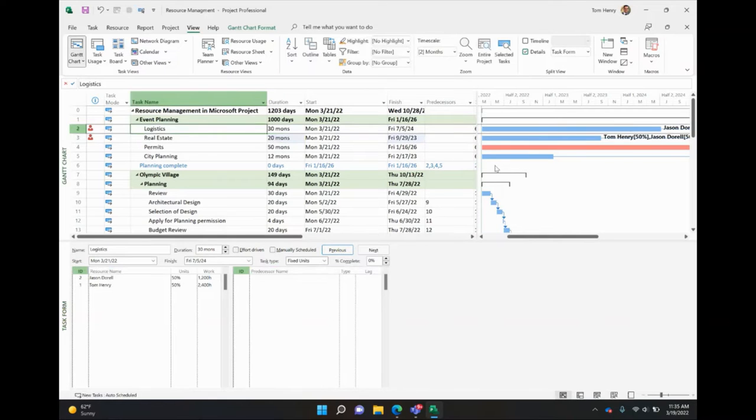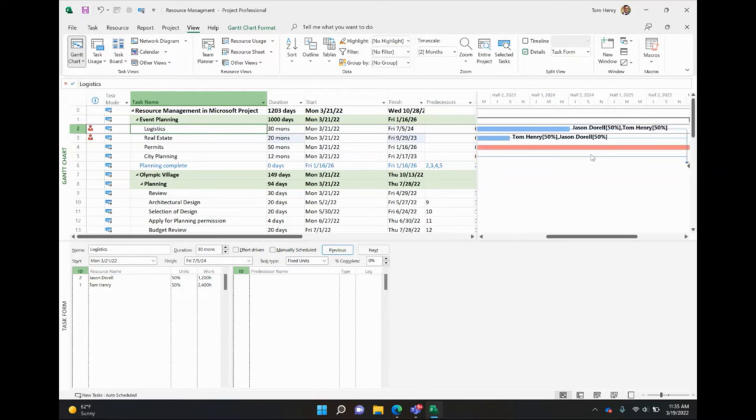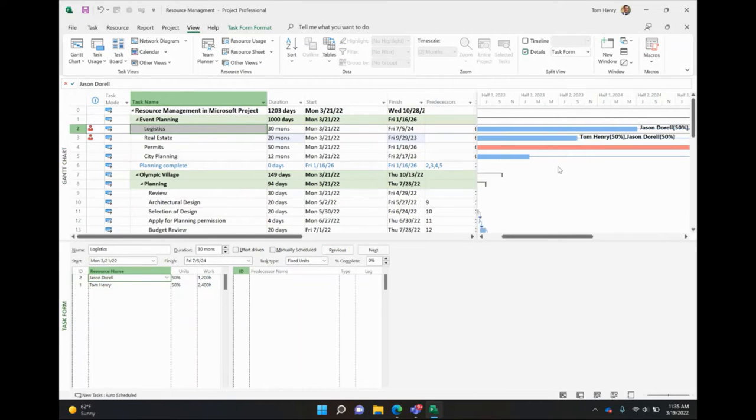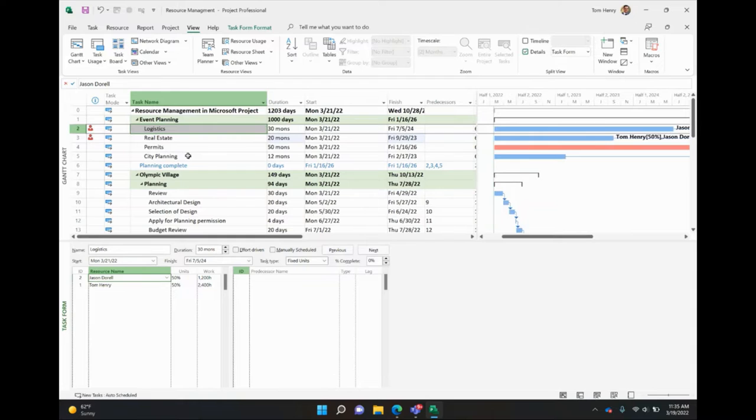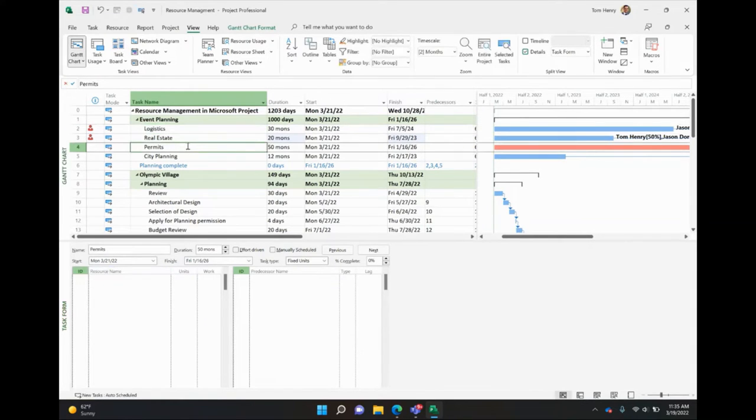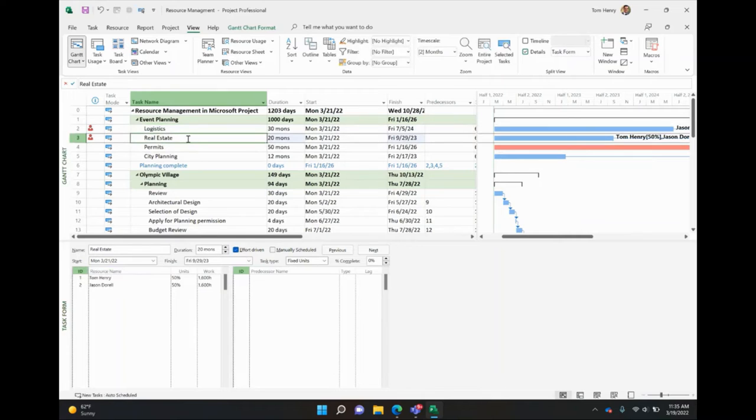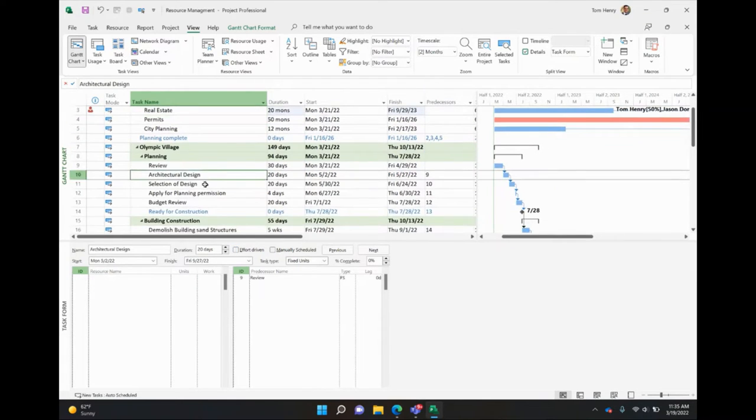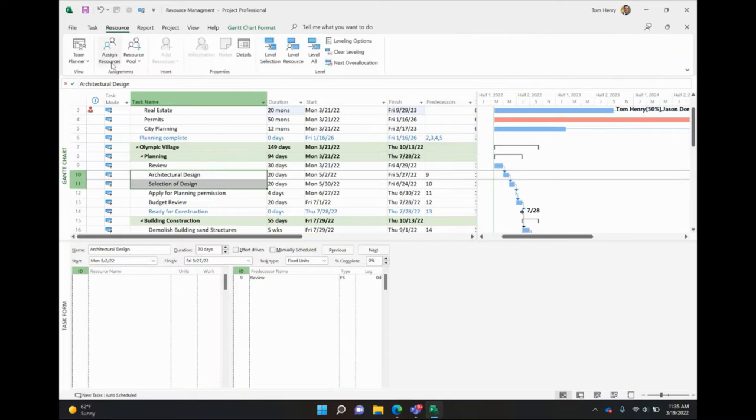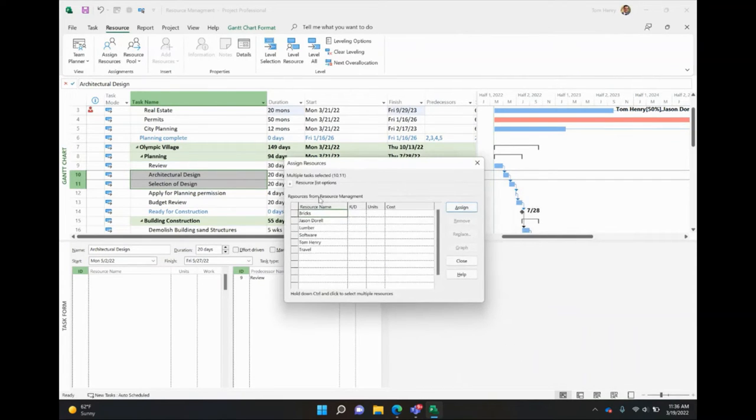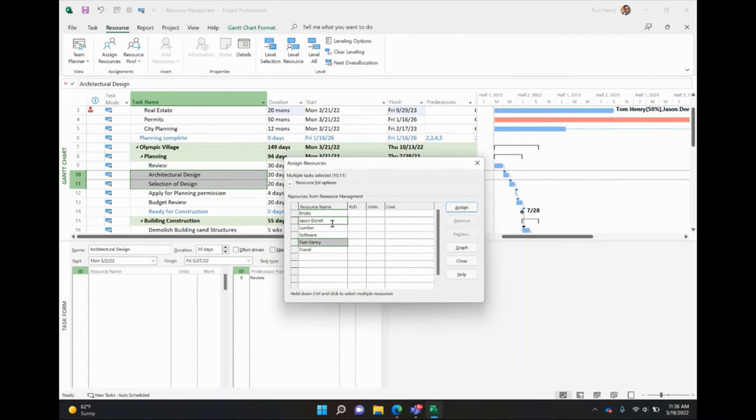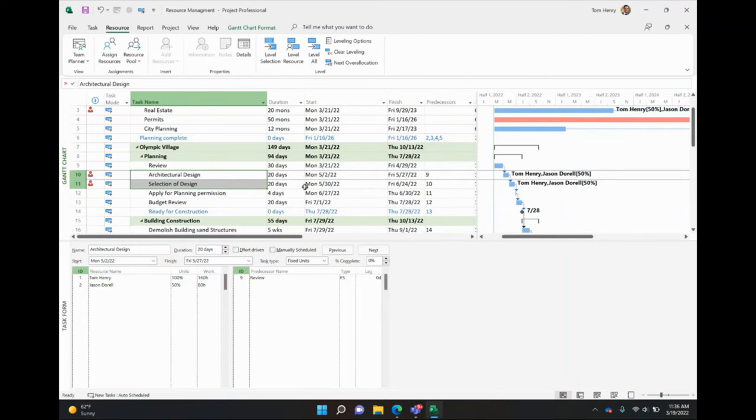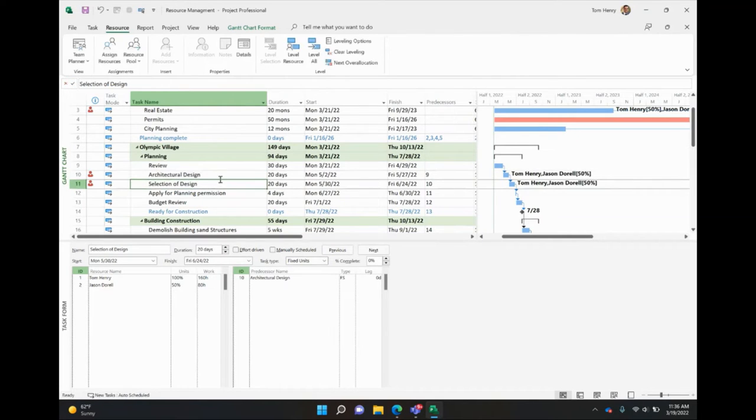Jason is also working on this other task, 50%. So there's some overlap there that we need to deal with. Not sure why, but they should be working 50-50 on each task. Maybe Jason's working on another task as well. But anyway, we'll ignore that for now. So there we go. That's a little bit about how to assign the resources using the task form. There's one other way that I really like, and that's to click on an individual task or even two tasks, like so, using the Shift key. Go to the Resource ribbon, Assign Resources. And in here, I can select one or more resources. I want Jason and Tom. And click Assign. And those two are now assigned.